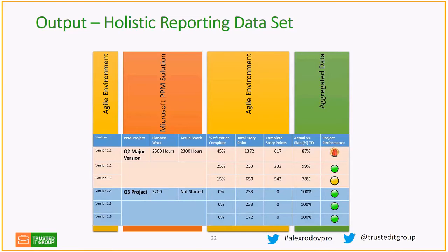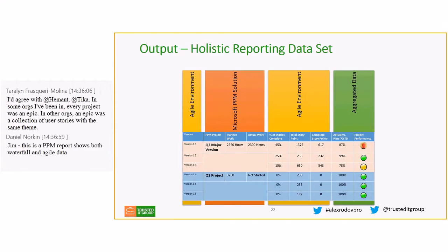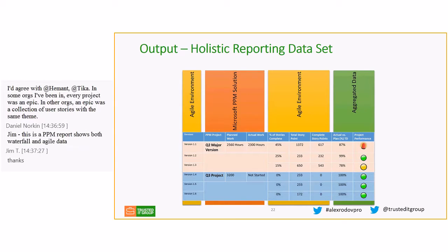And this is where 70% of you are interested in getting this particular information in place, combining these two pieces of information. It's sort of blending the earned value metrics, translating some of the story points calculation, actual story points completed versus total story points in the backlog, putting it on the timeline and calculating the earned value based on that, which in this case is calculated in terms of story points.